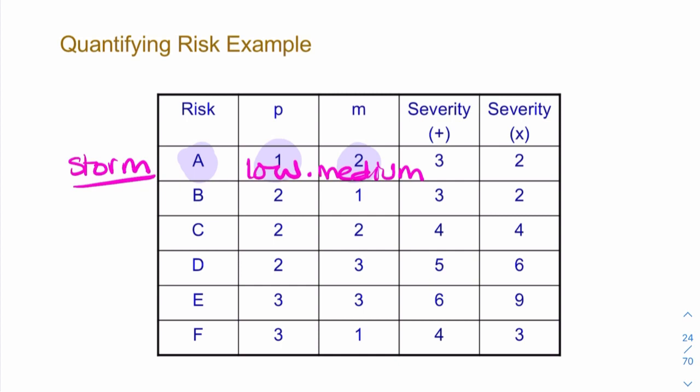But be aware that often in the literature you will find severity as the sum of the two. And when you did your risk assessment for your final year project, for lab work, for practical work, you will also have used the multiplication.